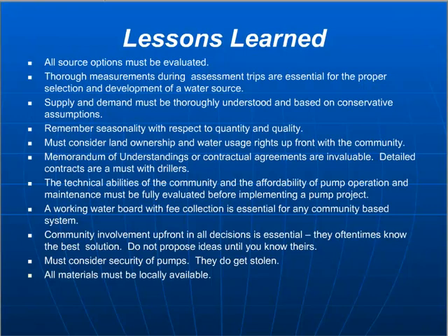Making sure you have some sort of water board, and I think that this will get talked about a little bit more in the subsequent water supply presentations, but in the first assessment trip it's important to lay the groundwork to ensure that there will be some governing board who's responsible for the water project and the fee collection. No matter what the water project consists of, there will need to be some sort of fee collection because it will need to be maintained and there'll be a cost for that maintenance. And if there's not fees being collected, it won't get maintained and it's not going to be a sustainable project.